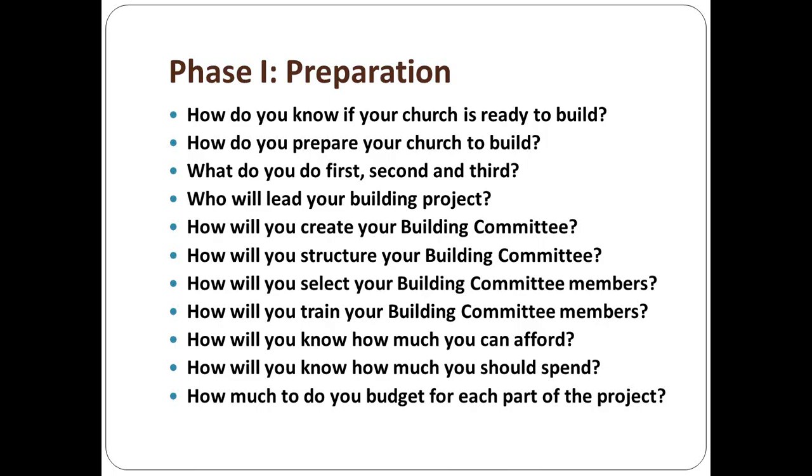Then there's FF&E. I would tell you just off the top of my head, 5 to 10%. Pre-construction fees and services. You've got permitting and maybe some other things you have to do like soil testing and borings and some other things you might need to do, surveys and so forth, that would come underneath that pre-construction that you're spending before you break ground. That may be management fees and permitting fees. And so you might have 1-2%. On a $1 million project, you might set aside $15,000, $20,000 for that. But again, folks, answering this, you've got to go dig into it with your industry professionals. I'm just trying to get you ready so you're thinking this way and even know that this is a part of the equation.